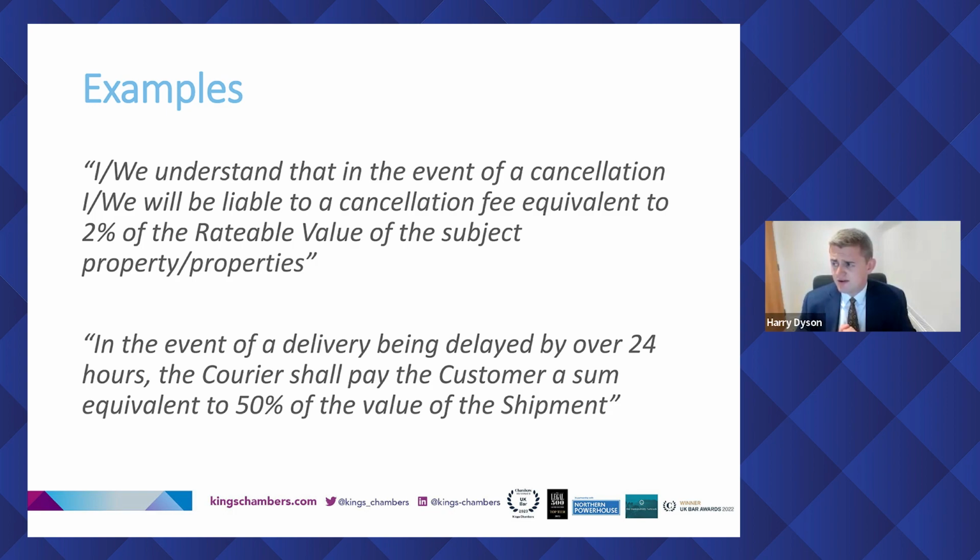The judge was with me on that point, and the third limb, which you'll expect was easier to overcome, was that the amount claimed was clearly extravagant and unconscionable in relation to the legitimate interest. Basically, because it was more than the full contract price had he done all the work, which we say he'd done pretty much none of it. But pausing there, remember there's no need for it to have been a genuine pre-estimate of loss, because he may say, well, I would have perhaps gone over my fee estimate, but it was clearly extravagant because it's more than what he would have been entitled to be paid in full, and it was clearly unconscionable to charge more for having not done the work in full than would have been charged if he had a satisfied customer going away very happy. So hopefully that shows, broken down, how a real life example can be tackled in court and defeated ultimately.